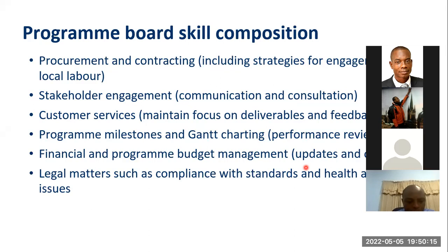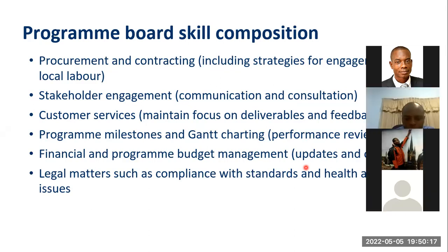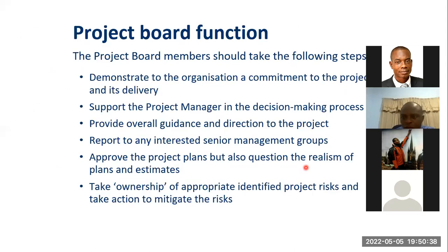Then we also have financial and program budget management. You need to have people with legal background. So all these are needed to form a program board, not just somebody. We like just bringing anybody to boards in Ghana, but it should be people with professional skills that can provide support. So the project board function, what do they do? They have to make sure they support the entire implementation of the project. They approve project plans and budgets, and they take ownership to make sure that the project actually works according to plan.